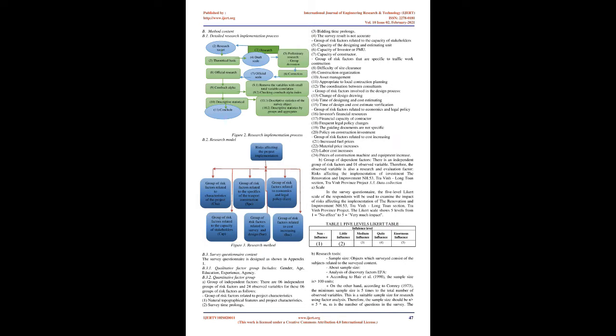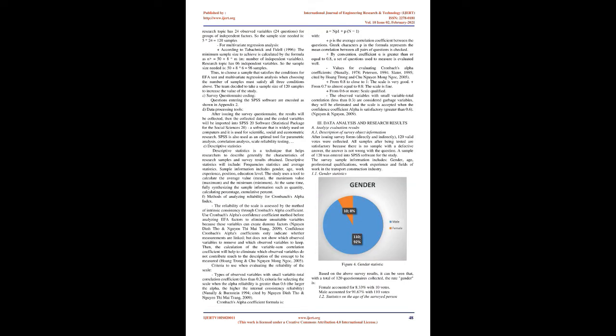R3: Group of risk factors specific to traffic works, including difficulty in site clearance, work stretching in a wide area causing difficulties in management and construction organization, and the coordination between consultancy units. Road traffic works require construction ground with a large and prolonged occupation area, so site clearance is time-consuming, difficult, and complicated. Construction management needs to be scientific to promote construction efficiency and avoid loss of properties and materials. The coordination between consulting units, especially supervision consultants, verification consultants, and design consultants, must be regular and continuous. Failure to perform these factors will cause delay, exceeding the total investment, prolonged complaints, and unsatisfactory quality of the work.